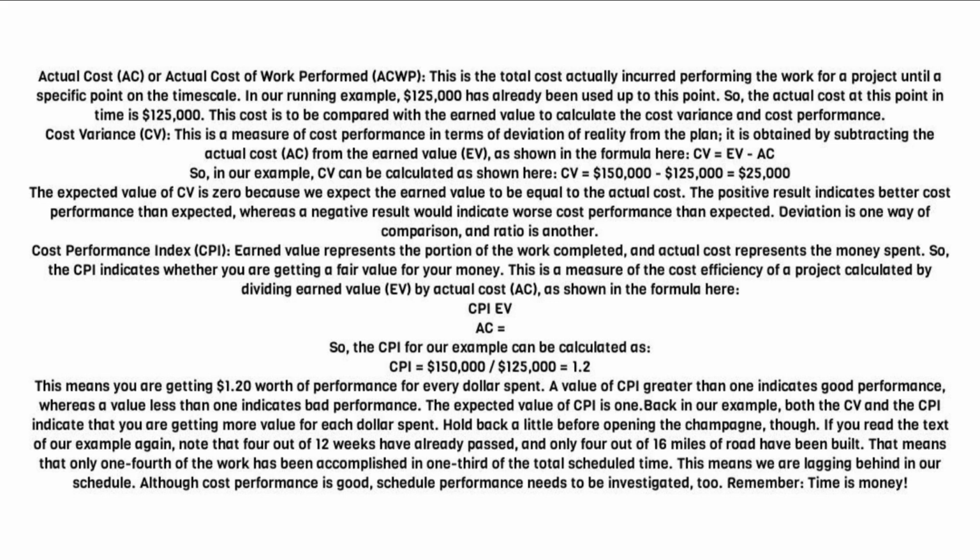A value of CPI greater than 1 indicates good performance, whereas a value less than 1 indicates bad performance. The expected value of CPI is 1. Back in our example, both the CV and the CPI indicate that you are getting more value for each dollar spent. Hold back a little before opening the champagne, though.